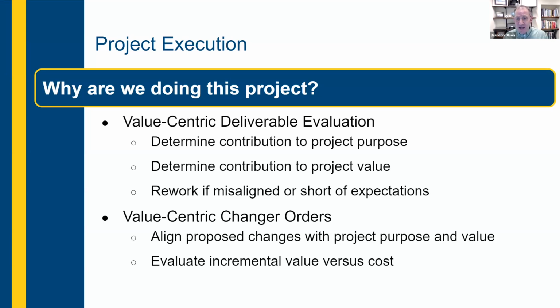The other thing is change orders. So a project change order is a formal way to modify the scope of the project. So in our project charter, we identify the scope. Here's all we're going to be doing for this project. Now, that scope typically changes as we start the project. Rarely do we finish a project with the same scope as what we started with. But recognizing, because of that triple constraint, that as we change the scope of the project, it is going to require more time and most likely more resources as well. So that does influence all of our project variables.